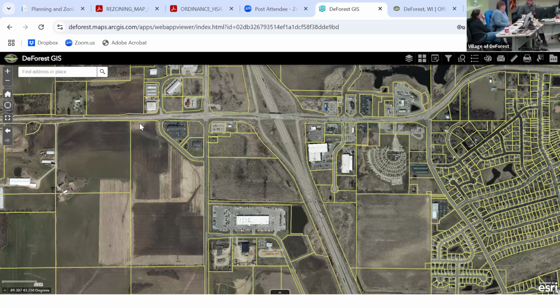That's typically a trigger when you guys see it and a conditional use permit requirement starts to come in. But in general, the types of uses that Ken mentioned are typically permitted by right uses. So they will come back before you for site plan approval. But as they fill in the tenant spaces, most of what he's describing sounds to me like permitted by right uses, all indoors, clean industry, warehousing kind of uses. So you may not see or know when business A or business B comes in and out because they won't have to come before P and Z typically.